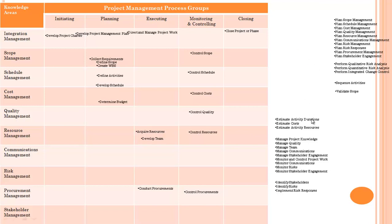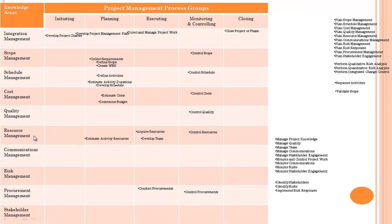Estimate activity duration will come under schedule management. Estimate cost will come under cost management. Estimate activity resources — all these estimates mean we are planning, so they will come under planning process group.